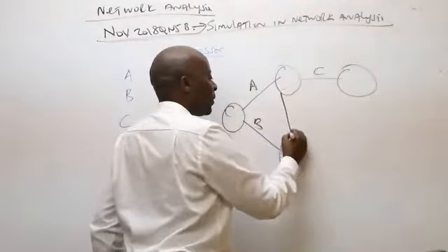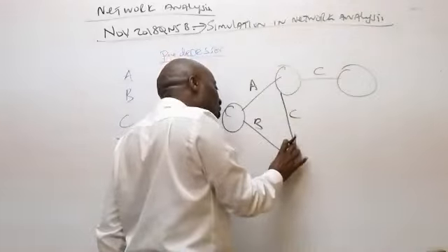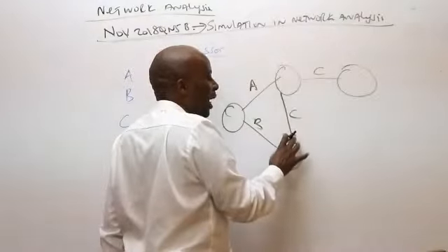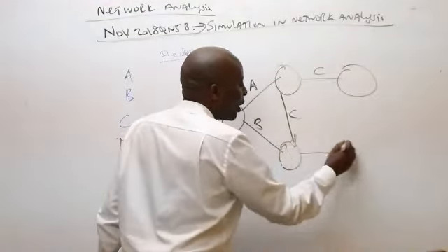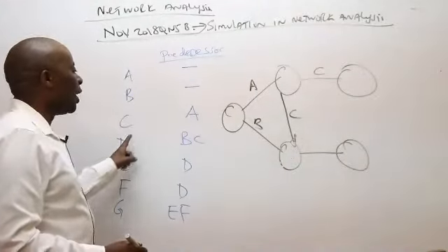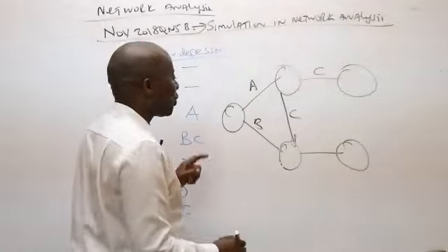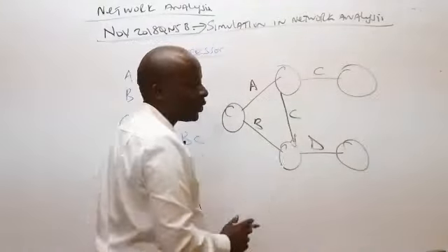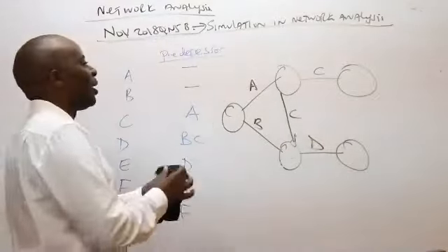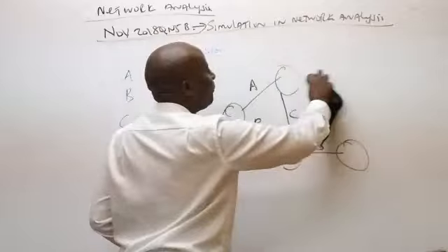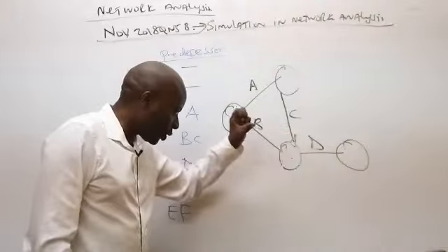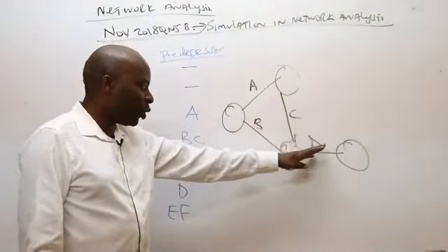You can come and drop C there, so that now this node signifies the end of B and C. And after the two have ended together, now you can come and pull an activity called D, which comes after B and C. Now I need to comfortably rub the old C. That's D, which is dependent on two activities ending jointly for D to start.